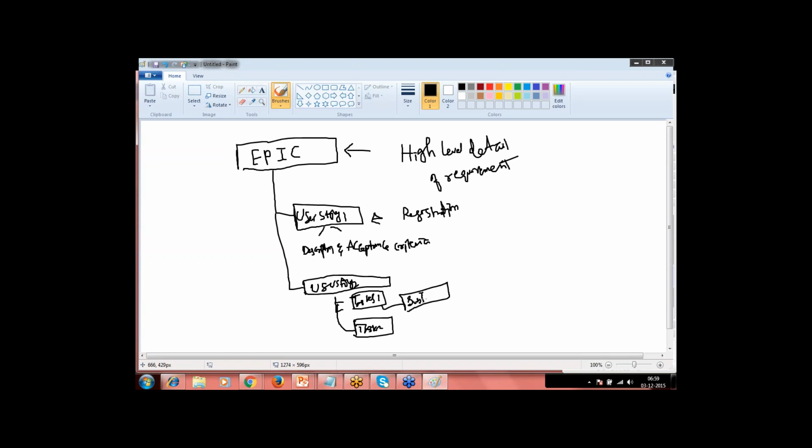What my experience is that the task should be broken down in such a way that it should be completed by one engineer. It could be a developer, tester, builder, whoever is part of that project, or sometimes a technical writer, somebody has to write a document. It could be anybody. The task should be completed in the same day.